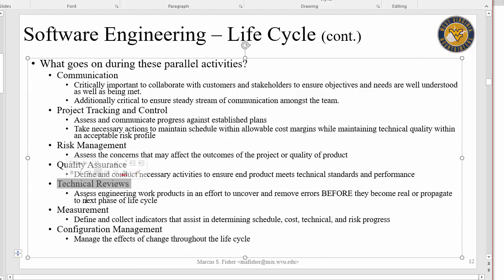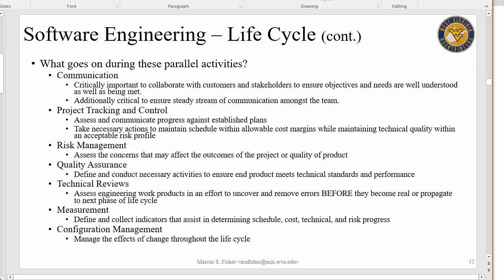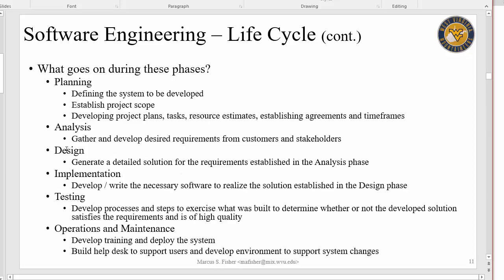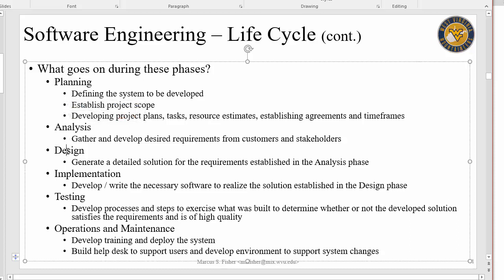But sometimes it's done. It's typically done at the end of each phase, in the beginning of each phase. So once we think we're done with analysis and we're going into the design phase, we'll have a technical review where our colleagues will present amongst ourselves as well as the external stakeholders. For example, if we're leaving the analysis phase and going into the design phase, we'll present what the requirements are, and we'll get feedback from the external stakeholders as well.